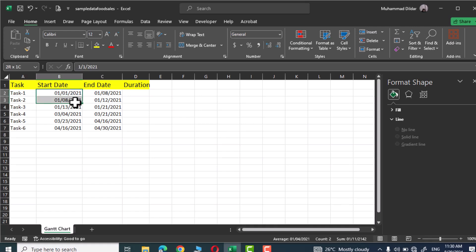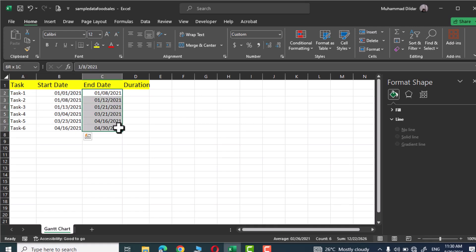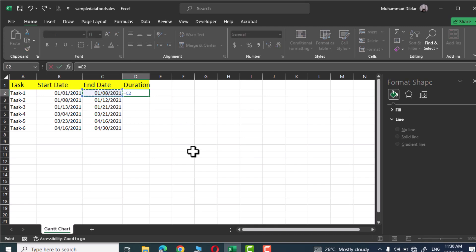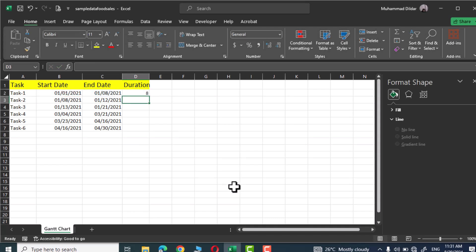These are the start dates of the tasks and these are the end dates. Let's calculate the duration for each task. We can simply subtract the start date from the end date and we would easily calculate the duration. So I would write equals end date minus start date and let's add plus one to it so that the start day may also be counted. Now press enter and there we have our duration.